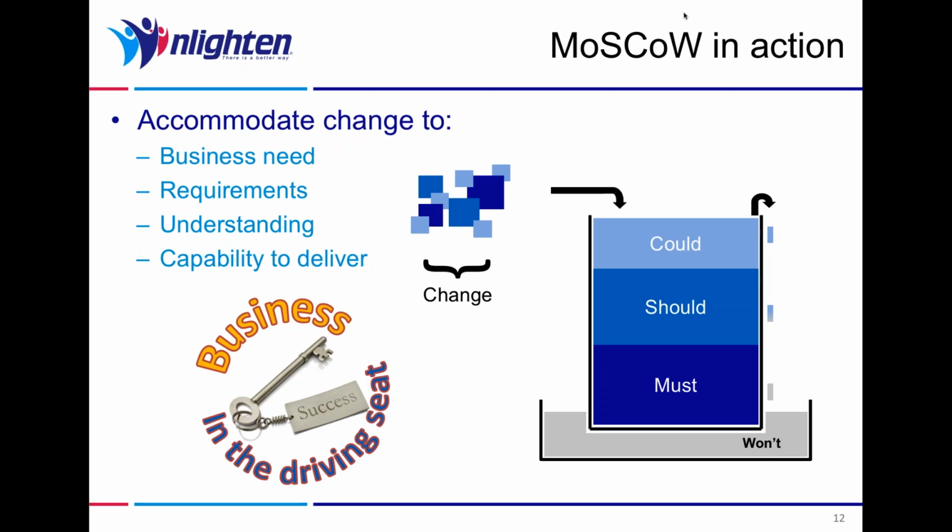That conversation gets increasingly tough. When you get into the should-have requirements where there's real value to some of these things, then it gets to be a tougher conversation. If you start those conversations with the trivia, people get used to the conversations and actually engage in that conversation to make good decisions about the things that are needed, and the things that could be left behind without too much pain.